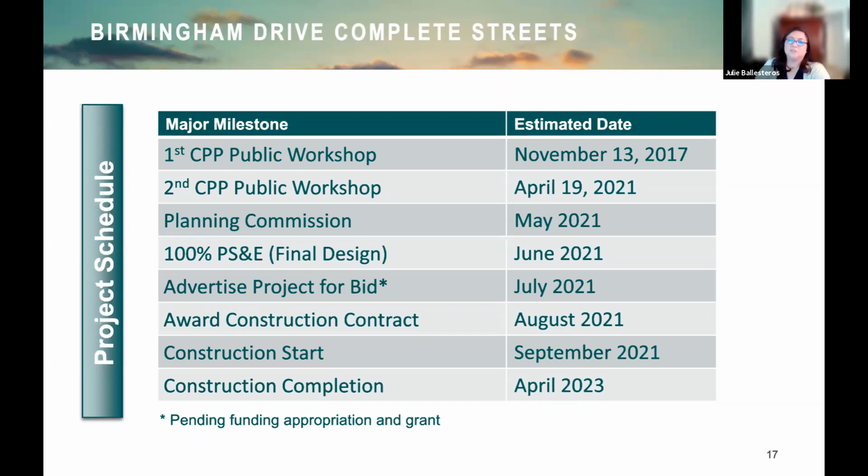There may be some questions about construction sequence, and I can elaborate a little bit about that. Once construction starts, we anticipate construction phasing starting with undergrounding of the utilities, installation of the infrastructure, such as storm drains and the water. Then the next phase will include sidewalks and streetlights, the rain gardens, the roundabout, and the curb ramps. And the last items would likely be new pavement and striping of the crosswalks, the travel, and the bicycle lane.